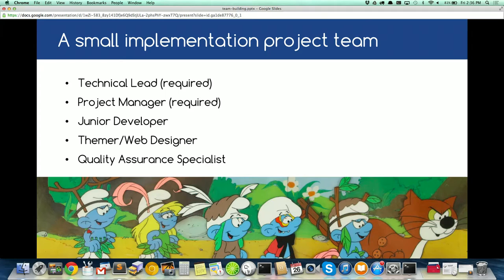A small information project team needs five roles. At minimum you need two: a technical lead and a project manager. If the project is slightly bigger, you can add a junior developer, a themer or web designer, and a QA person — or someone who combines roles. Early on at Ikina when we had 10 people, our PM was also our QA person. Now we're 40, we have automated testing, and I'm managing 20 developers.